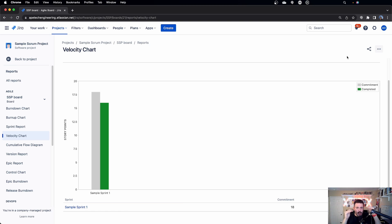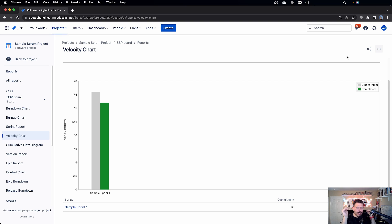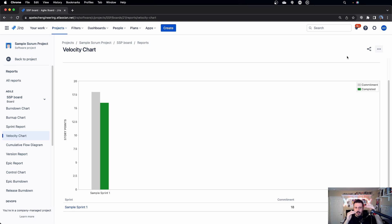These bars, the gray, which is the committed start of the sprint, the green, the completed when you completed the sprint, those should be close to each other.